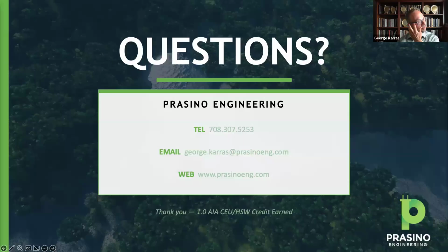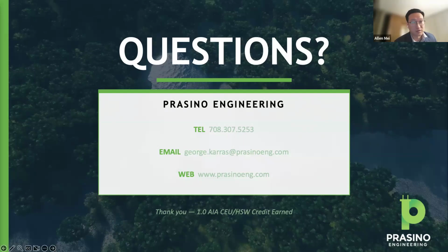Also, it depends on the kind of documentation you send to AHJs. If you list those requirements very clearly and tell them how you mitigate, right? On most of our projects, we work very closely with the architects to do better detailing on the envelope, and we point to those details and how the thermal bridging is being mitigated in the energy code compliance documentation. Saying, how is that mitigated? Where can you see that? I think that also helps with the review. And if they don't see a problem, why would they comment? I think that's also very important.